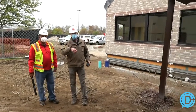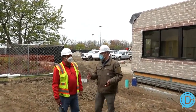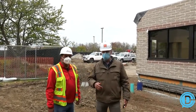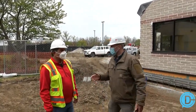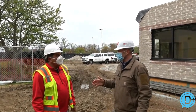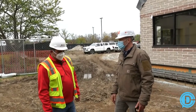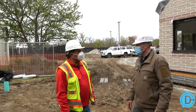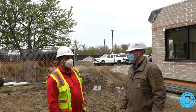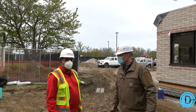Hey everybody, this is Dave Cooper, and we are at Good Samaritan Hospital with Axis Construction and MODLIQ. We just finished an entire building, almost 7,000 square feet, in less than 2 days. This is absolutely amazing, John. It worked out the way we planned it. We wanted to get everything set in 2 days. We set the last module about 45 minutes ago.